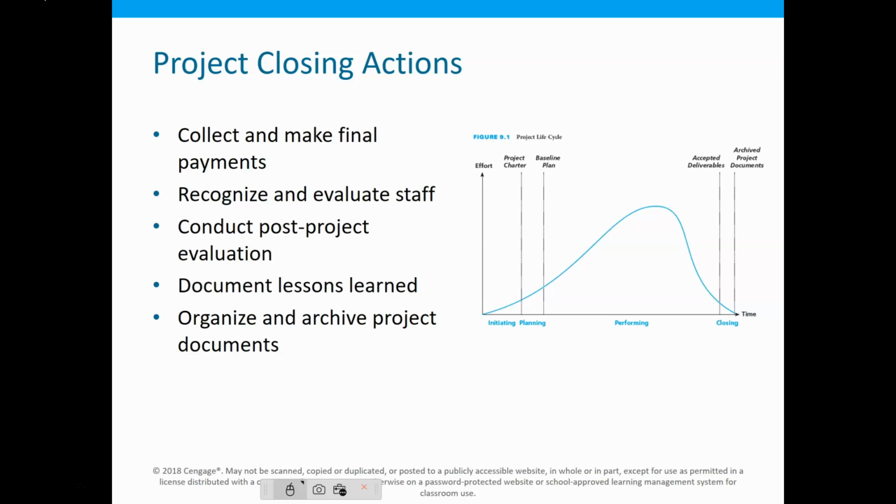That deliverable would be, I get that certificate of occupancy. In other words, it's passed all of the inspections. Now we get handed that certificate of occupation. That doesn't mean that the project is done. So there's probably a few check-off lists. There's things we have to finalize. So in terms of a house, you have to finalize that financing. So you'd have to fill that piece.